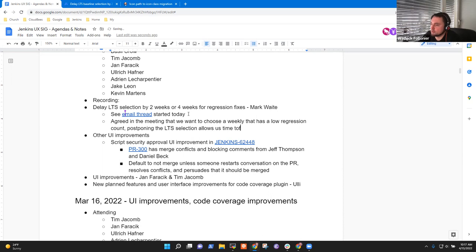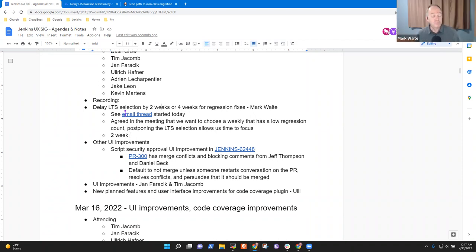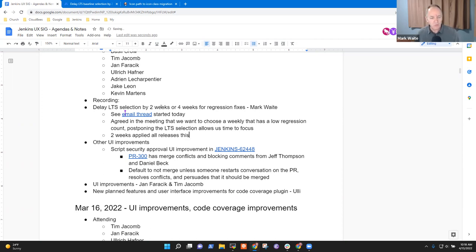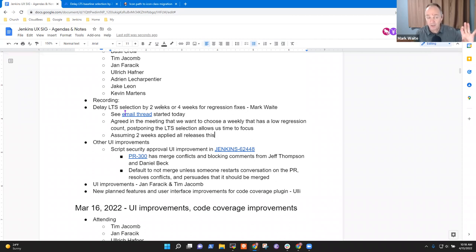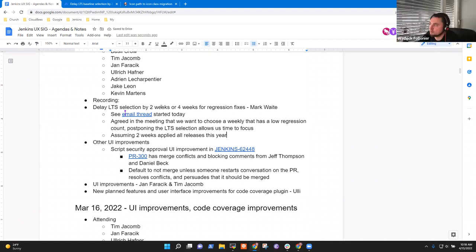So just the difference between the two weeks and four weeks: with two weeks, we reduce a bit the time but we are keeping exactly the same schedule as usual. With the four weeks, we are delaying the next LTS version. I was assuming two weeks applied across all releases this year. But that may, if we go beyond two weeks, we now may have used up the cushion that we have. So the cadence is 12 weeks. So we use 48 weeks of the year. A year is 52 weeks. If we use more than two weeks, we may actually spill over and risk that we end up doing a release late in December.